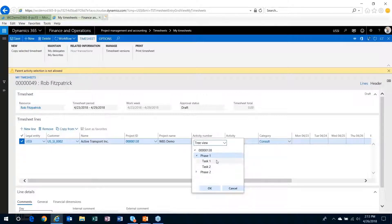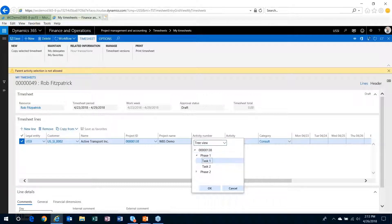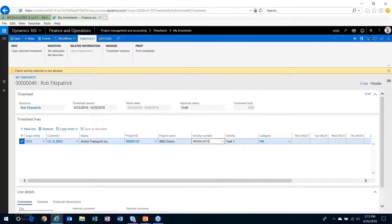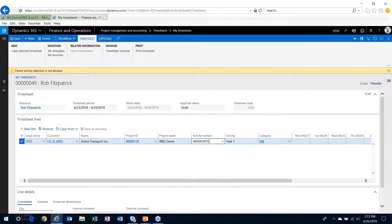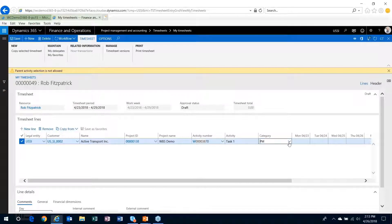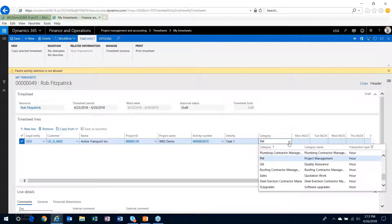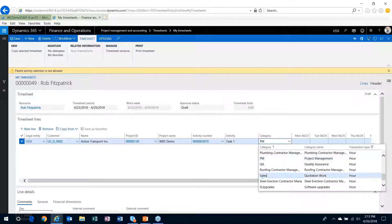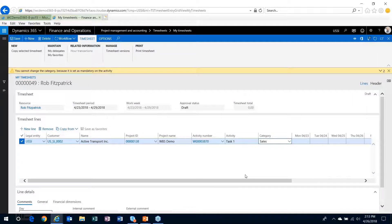the lowest level nodes down here in the work breakdown structure. So I'll choose task one. So phase one task one is also the task that I did not want us to be able to change the category on, so that defaulted to PM.